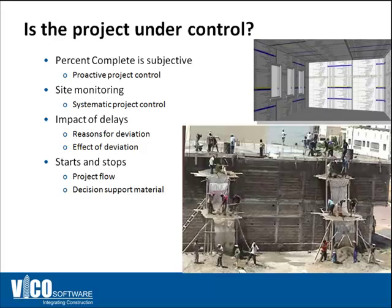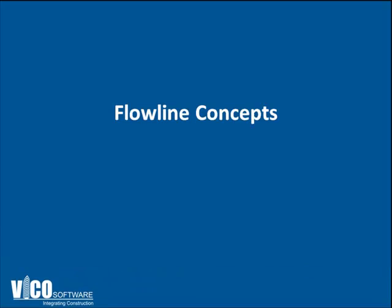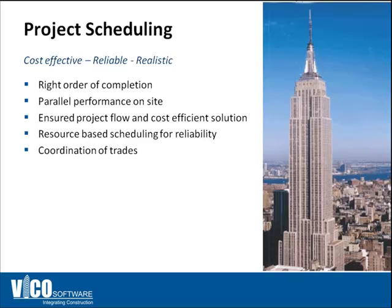Flowline is actually not something that is new. It was used on building the Empire State Building. The Empire State Building was built in just a little over one year.